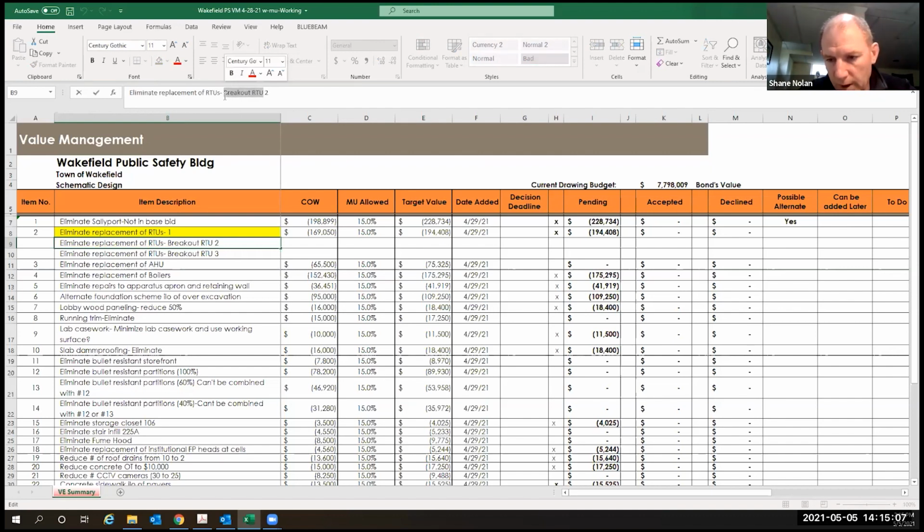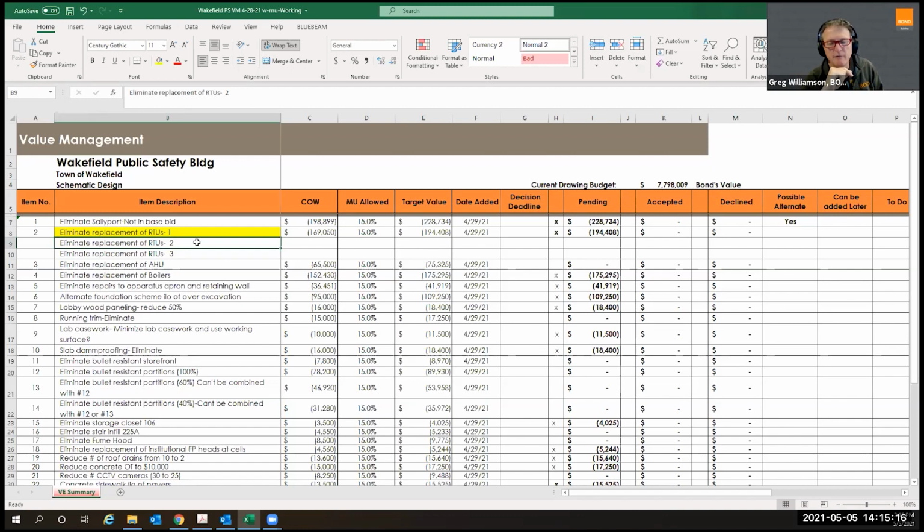Because we have to draw all the ductwork and the additions anyway. We were doing that regardless of whether we replace these units or not. You just have to be careful that if we are lining up 4 pieces of equipment and the Sally port, and those are 5 alternates, that they have to be accepted in precedence and priority, and it can change the bottom line of the final sub bid successful awarded contractor. Yeah, that's understood, and I'm not sure we need to get into that much detail in sequencing them today.